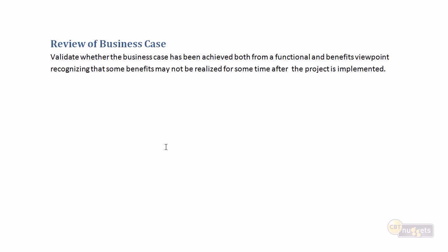But recognizing that the end of project report is typically produced very soon after the project is completed, some of those benefits may take some time until the project has been in production for months or even a year before the benefits are fully realized.